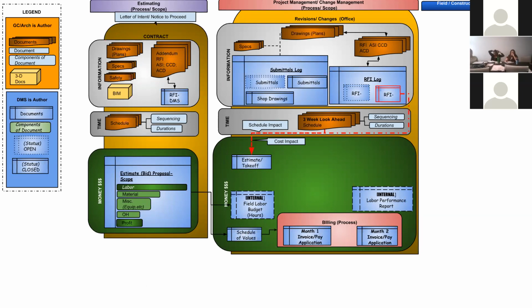If they added 2 feet of wall, sometimes we just estimate on an Excel sheet, or in our heads we just say what this is, and we can provide information called a ROM, which is a rough order of magnitude, which is like just a high water mark to let them know it should be about this much. And then they'll ask for a more detailed estimate later.